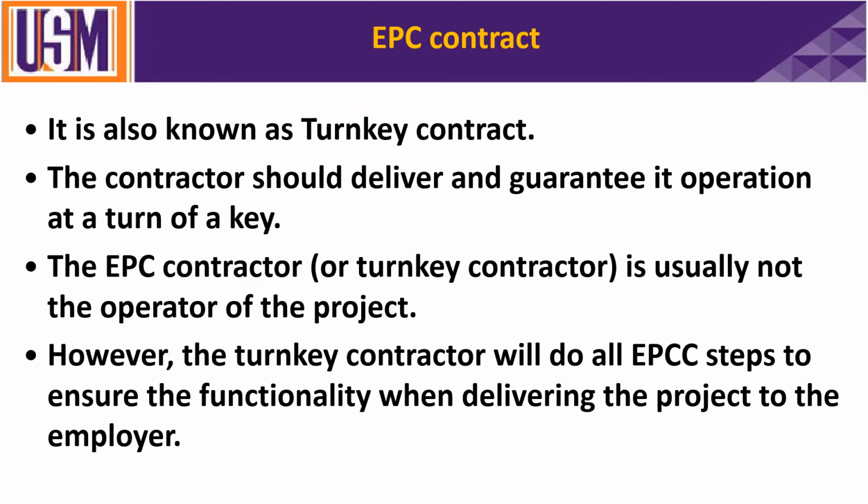However, the turnkey contractor will do all EPCC, even the commissioning, as we mentioned before. But in this case, commissioning will be very limited to testing only. So they do commissioning, but up to the testing. Then the other company will come and do the operation, the maintaining, and the after-sales service for customers and so on.